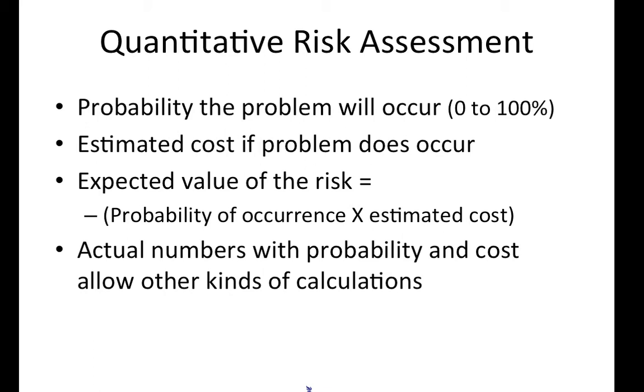The expected value of the risk equals the probability of its occurrence times the estimated cost. Although expected value is technically correct, expected cost may make more sense to the audience.